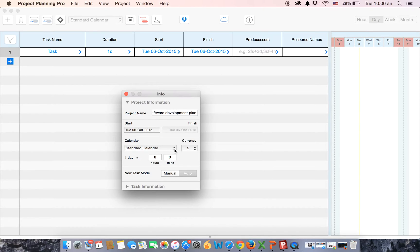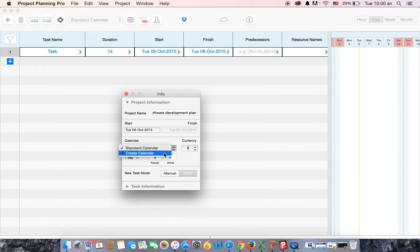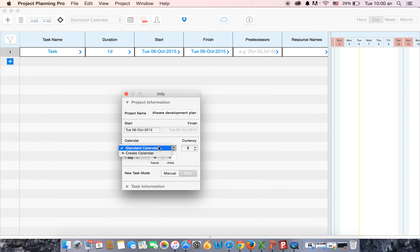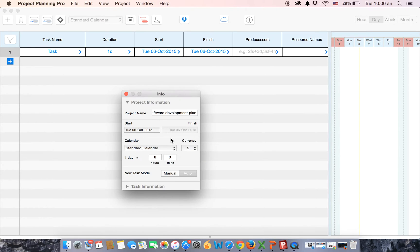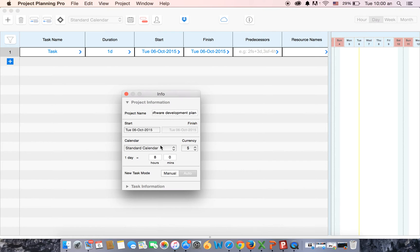You see the calendar option here. The standard calendar is the one that is already selected. If you want, you can create your own calendar by clicking on create calendar option. We have multiple currencies to choose from. Now because we've selected the standard calendar option, one day in your project will have eight hours.